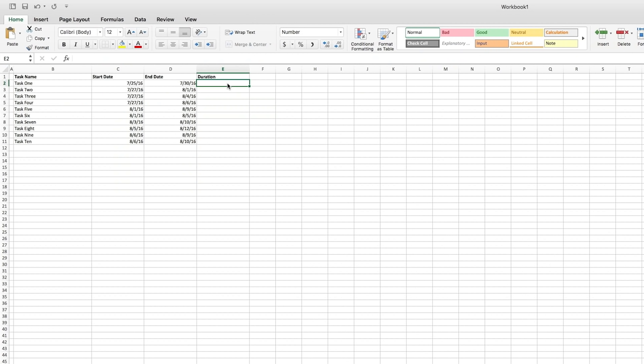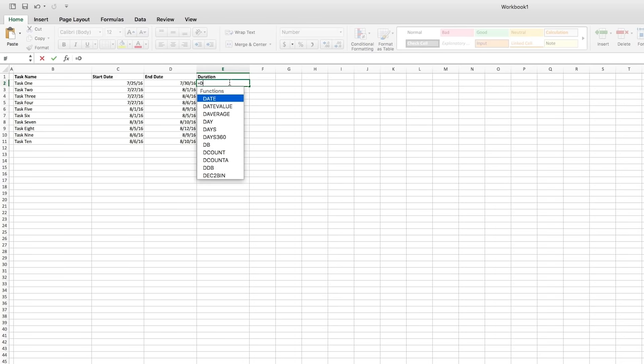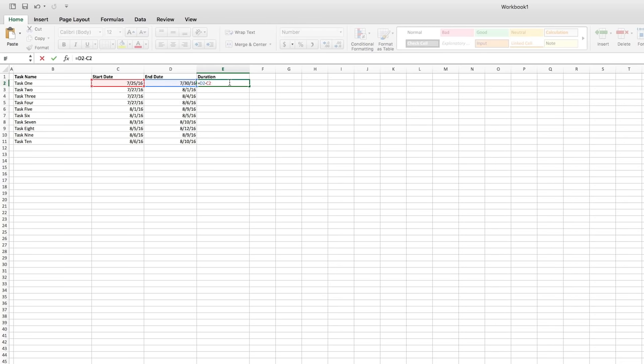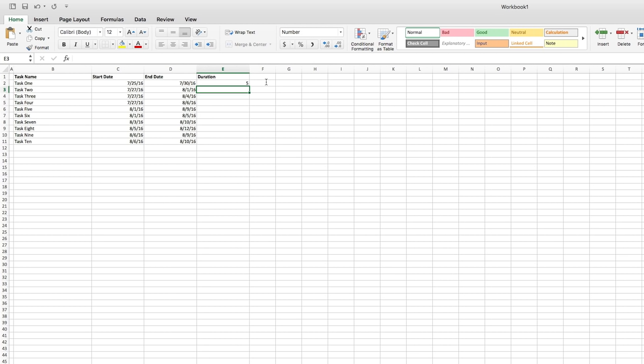The easiest thing to do is have the Duration field calculate the appropriate duration of the task based on the start and end dates. This is a simple formula. We'll start in cell E2. The formula is D2 minus C2. That will give us our calculation and in turn create the taskbars for us in the Gantt chart.